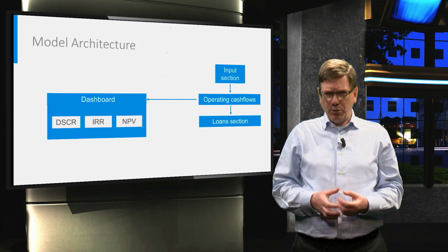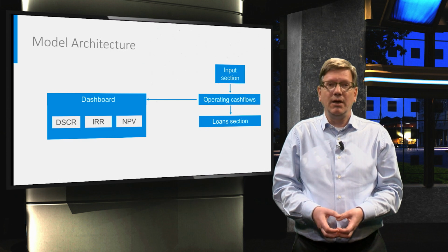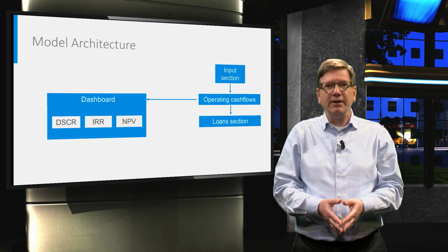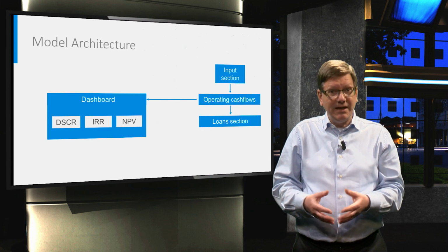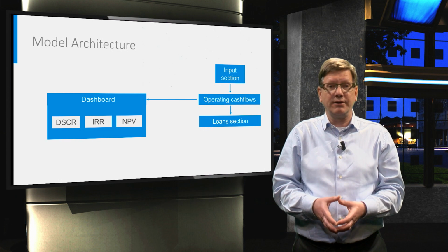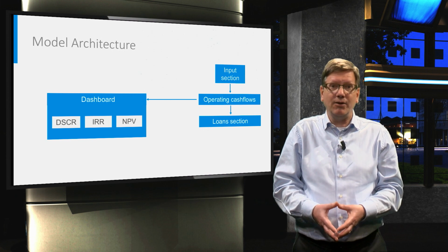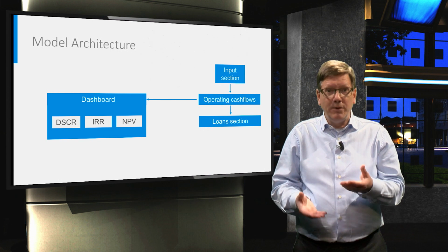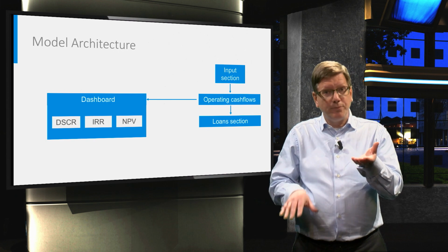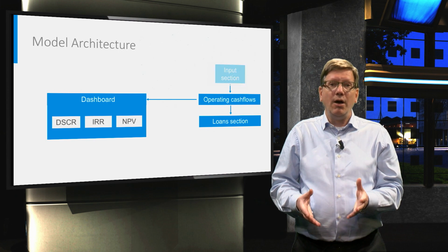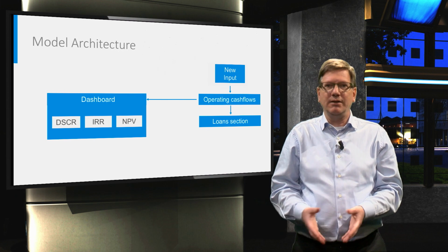We need to remember that we are using cash flow forecasts to determine how much to fund today. But once we borrow, we'll have a very real debt service obligation. It will be extremely important to have a high degree of certainty that the net cash flows will indeed not be lower than our forecast. This comes down to analysing in detail the sensitivity to risks that could occur, to increase the cost or to reduce the income. The model enables stakeholders to analyse the impact of changes.